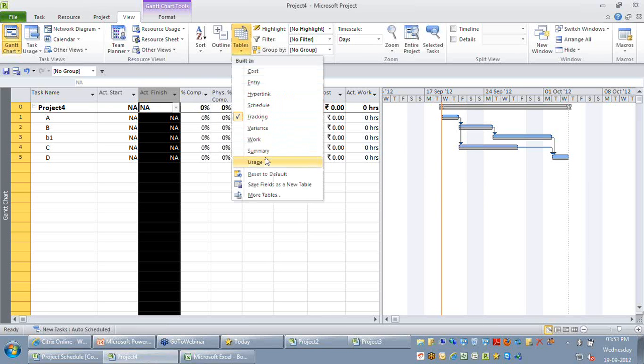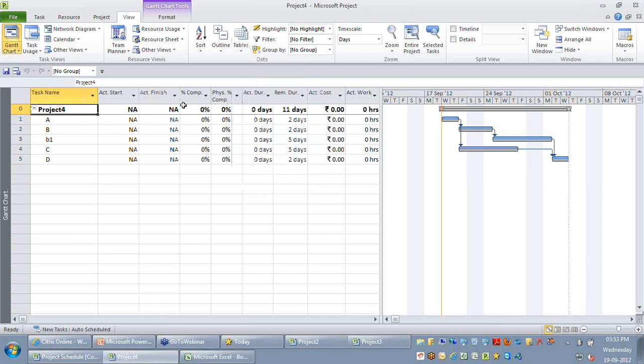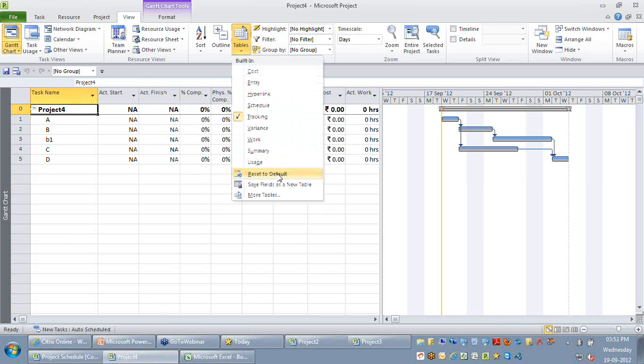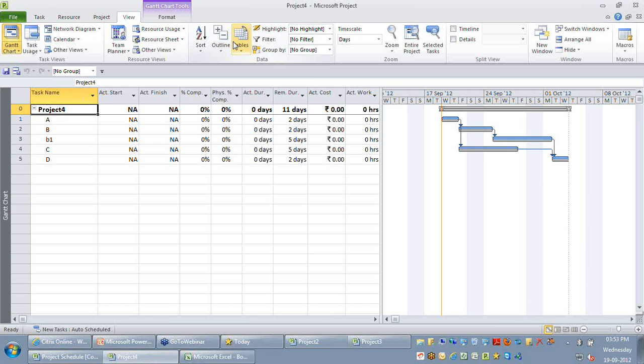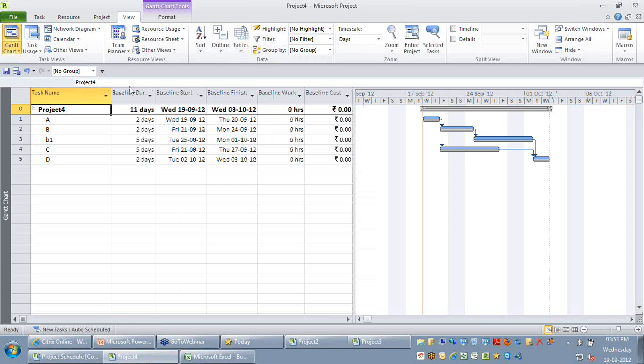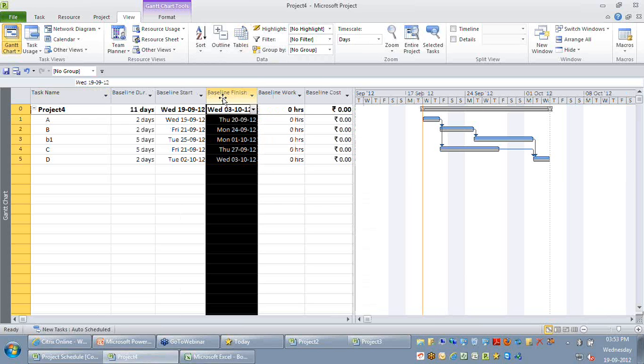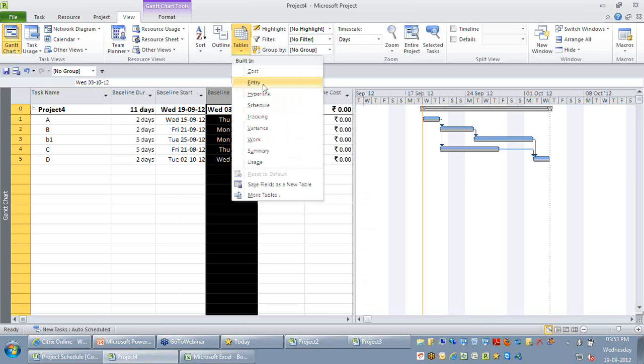To know what has been committed to the customer. That is what your promises are. Based on what has been promised to the customer and what you have recorded on your tracking table, you will be able to predict your current start date and the finish date of your other activities. So this is how your scheduling ideally works in Project.